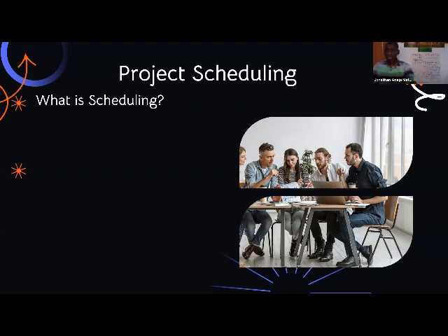And you just schedule the cash flow. It helps your budgeting. It helps the accounting department to know how to disburse funds. And the procurement department, MS Project can also schedule your material so that procurement department will know when to buy what material for you. When do you need cement delivered? How many bags? If in total you need 1,000 bags, 300 bags is week 5. Scheduling just takes care of that.